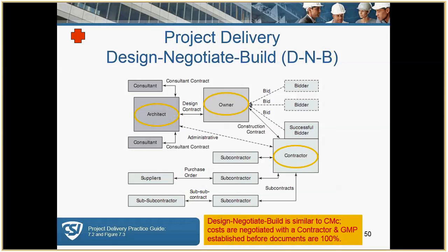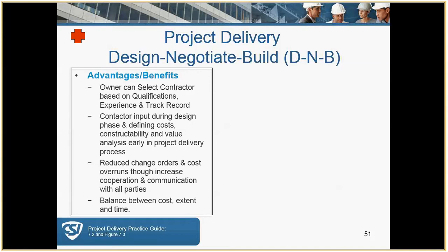So this is most commonly used in the private sector, and it's similar to the construction manager as contractor. The contractor is selected based on qualifications and their relationship with the owner, not necessarily the low bidder. And the question here that you might get is, is this a single prime or a multiple prime contract? And the answer is that it would be a single.